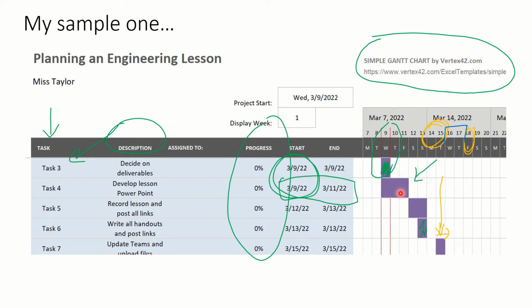So you might be ready to 3D print something, but it might not get printed for 3 days because we might have a backlog with the printer, or something could go wrong with the printer. We need to troubleshoot it. And so you don't want to be doing nothing while you're just waiting for the 3D printer. So you need to have something else that's going to overlap with that so that you're productive on those days.